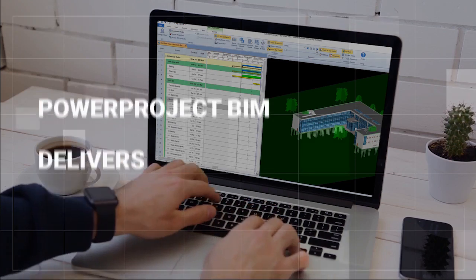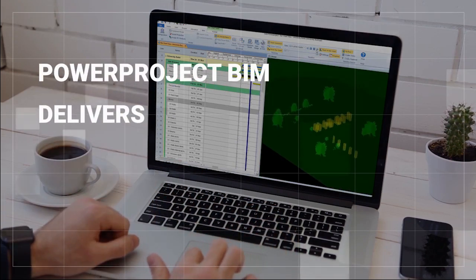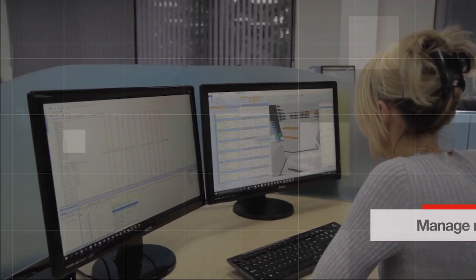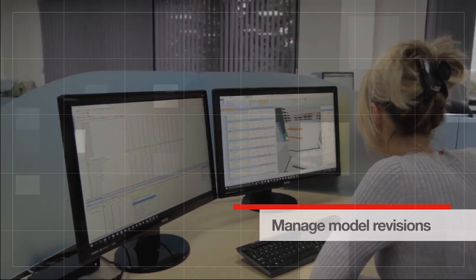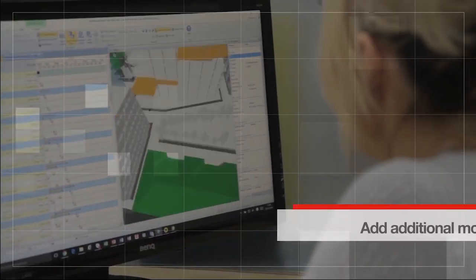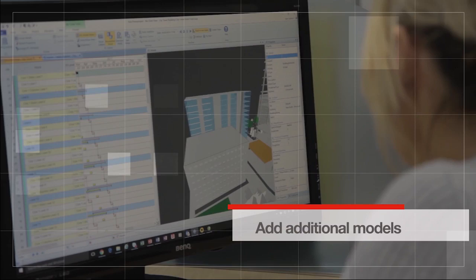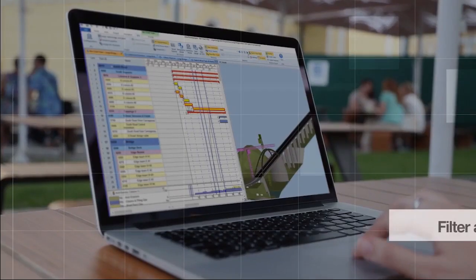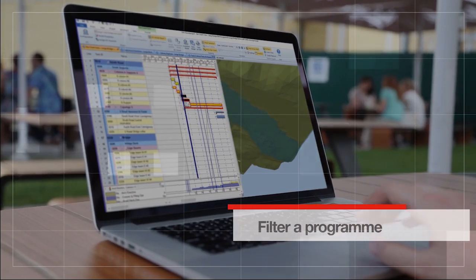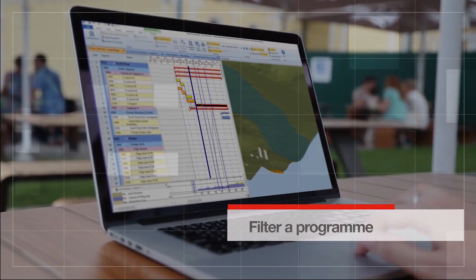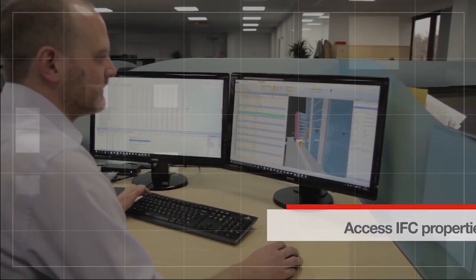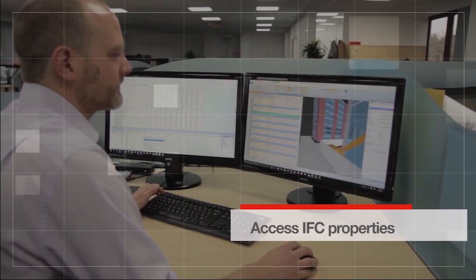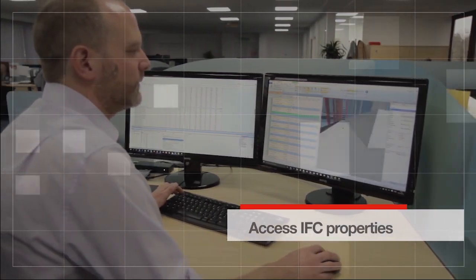Some of the powerful options that PowerProject BIM delivers include managing model revisions as the design evolves, adding additional models to reflect site objects such as tower cranes, porter cabins, and hoarding, filtering a program and timeline to show subcontractor or resource-specific views, and accessing IFC properties to analyze quantities and dimensions and to inform estimates.